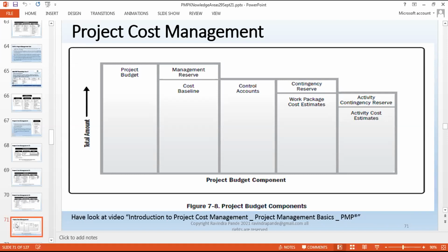And how do I deduce this cost? I have scope, I have schedule, and I have an estimated number of hours. And these aggregated costs are normally clamped to a resource with the number of hours I'm going to use on this project. Even if you use any COE, SME, or the business experts we have within our organization, their cost gets added to these activities because you leverage their thought process and their work hours within your project.